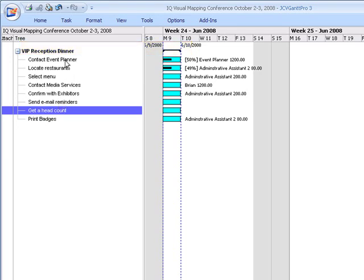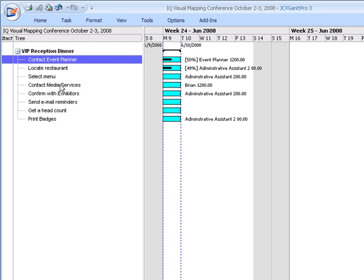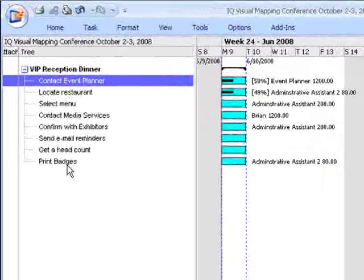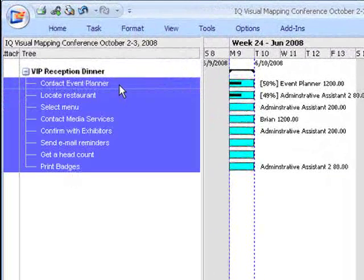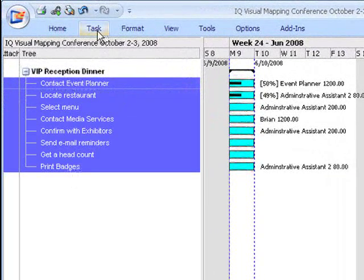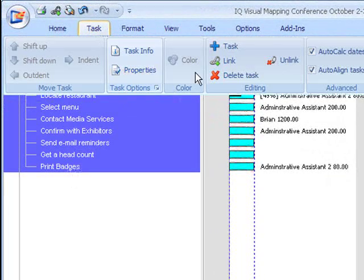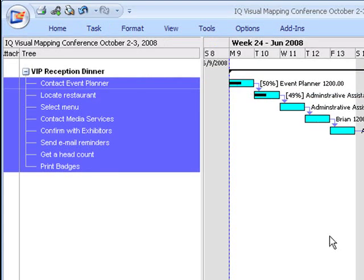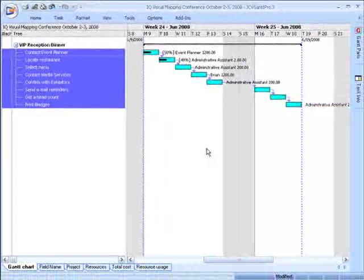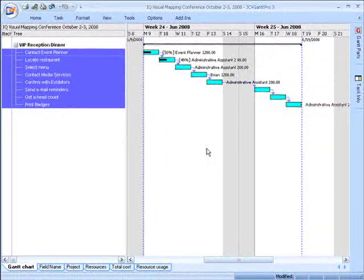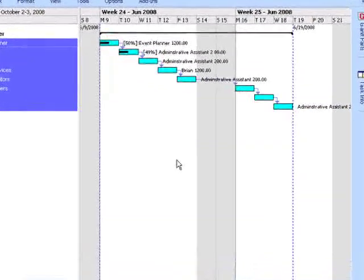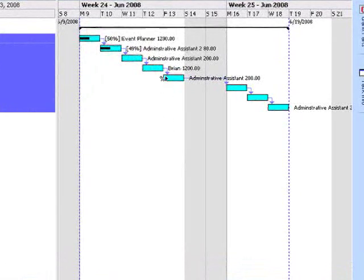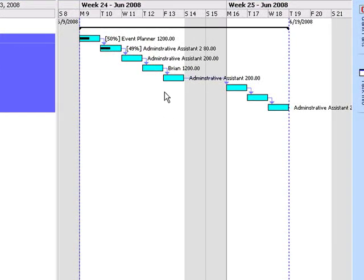Let's see what happens when we start to link the tasks. So I select the tasks, go to my task, and I link them. Notice how now the events are cascading and notice the arrows that JCVGantt put in. These are known as dependencies.